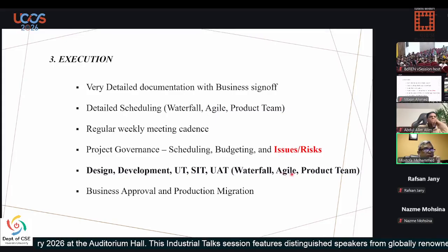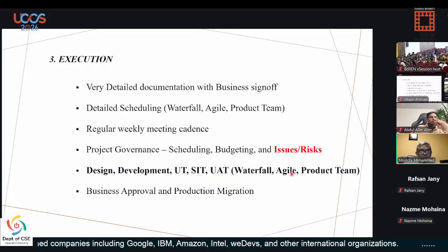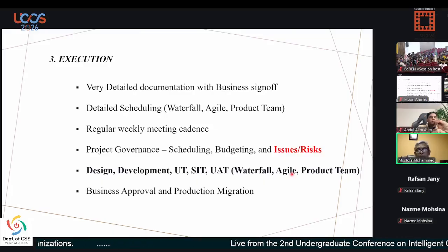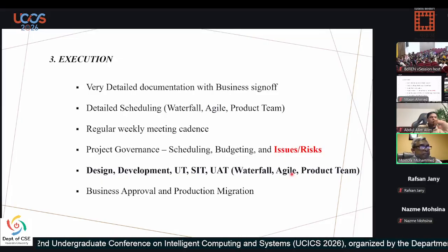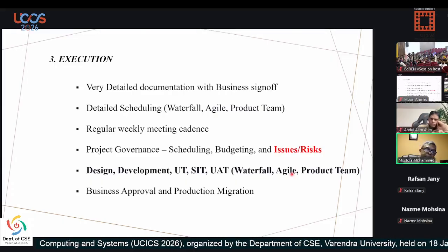So they have something called agile ceremonies, where they have the retrospective, when the work is in a sprint, like 2 weeks, 3 weeks, given different agile methodology, so the framework. So every 2-3 weeks they run the sprint, develop the code, and they learn what exactly they could improve. So that lesson learned in case of agile is being implemented or taken care of in subsequent sprints. In that way, agile is more efficient to take care of the errors that happened in the last sprint versus the new sprint.